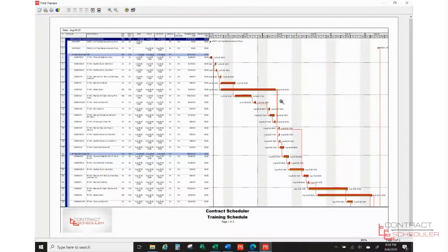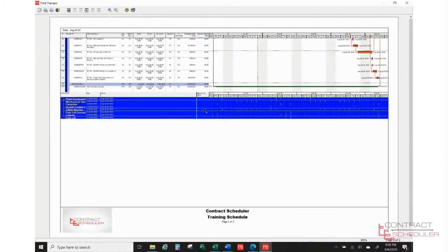And I have the schedule up above. And if I come down, then you can see down here at the bottom, it tells me all my resources, right? Because I highlighted them and I collapsed the fields. And then I made sure with my options that I divided by 8 so that I just showed per day. And it will tell me for each particular day how many resources I need of each type over here. Okay, very, very important.